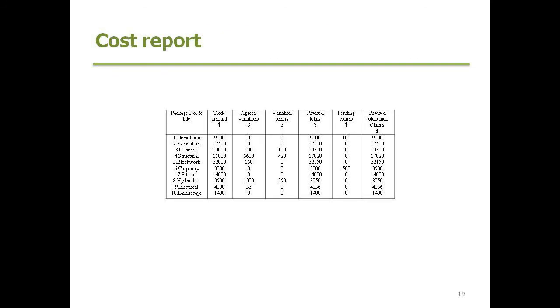And bringing a lot of that information from those last half a dozen slides together, it reconciles into a cost report status. So we're looking at packages or trades overall, the trade amount, and any variations associated with it. It's giving a statement of account of where we are today, and with pending costs in there as well, where we're likely to be.